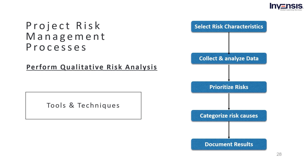In the next step, we have to collect data and analyze it. Individual risks to be assessed are based on information collected. Therefore, data collection and evaluation tools — including interviews, workshops, and references to databases of prior projects — require management support and attention. In addition, it is important to protect against bias in data gathering, which is important when relying on expert judgment.